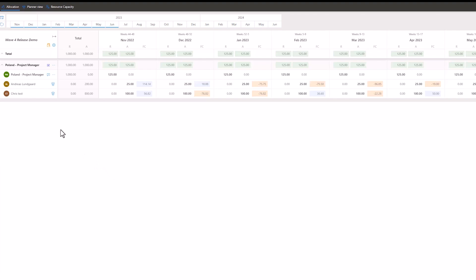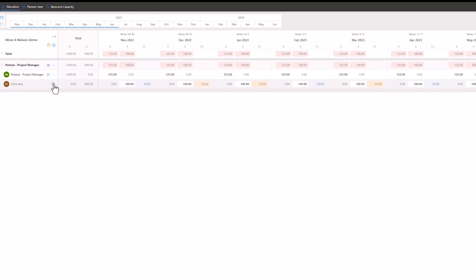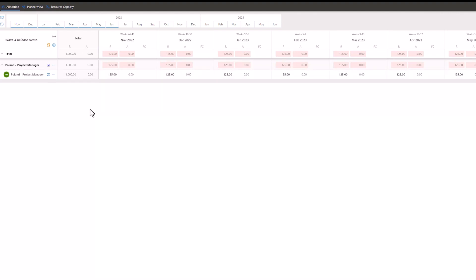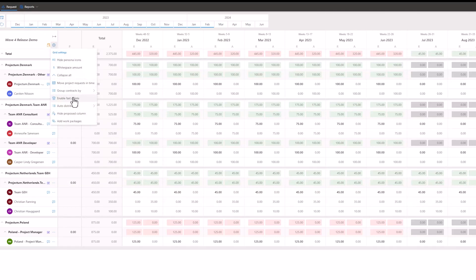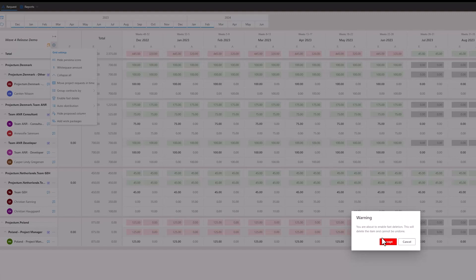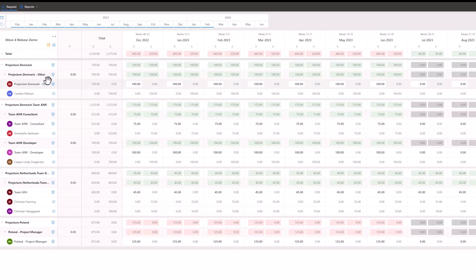As a Line Manager, you are not able to delete any generic resources since you are not the project manager of the project. If you are a project manager, you will also have the possibility to enable Fast Deletion and you will receive the same warning. When accepting this, delete icons will appear as well. You will notice no delete icons are visible on the named resources. This is because, as a project manager, you cannot delete named resources. However, you can delete a full contract including generic and named resources.